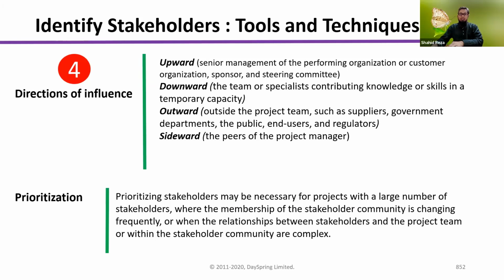When you are analyzing, you also analyze upward. You have to consider your bosses in the ladder. Maybe you are a project manager, so you have program managers and portfolio managers, and maybe you are reporting to functional managers and the PMO office. So you have to do an upward analysis in case they have any requirements. Downward means your team, or those who work below you. That analysis you need to do.